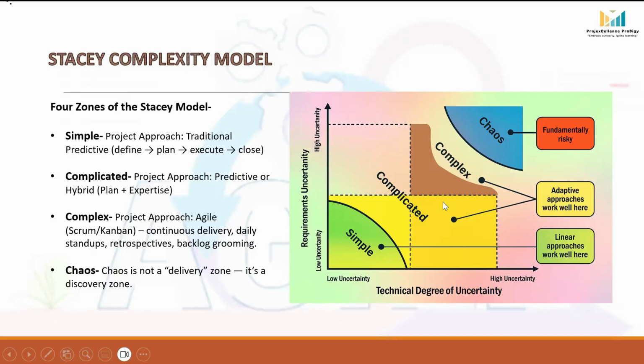In this case, the team uses an adaptive approach, agile methods like Scrum and Kanban. Customer feedback is essential. Elderly users may give feedback on usability, font size, button placement, which significantly impacts redesign. So the team builds a working version in a 2-week sprint. They get feedback from the users and then iterate to add or change features.